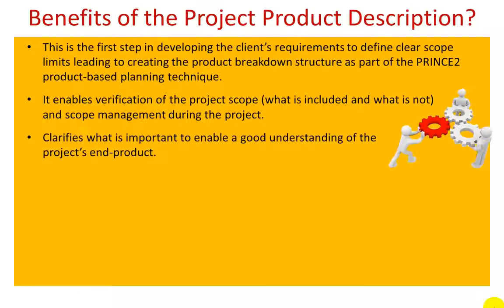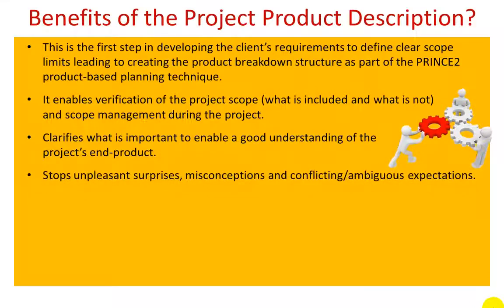The project product description clarifies what is important to enable a good understanding of the project's end product. Without a project product description, you may get many unpleasant surprises, misconceptions between the main stakeholders, and worse, conflicting or ambiguous expectations across the whole of the team.